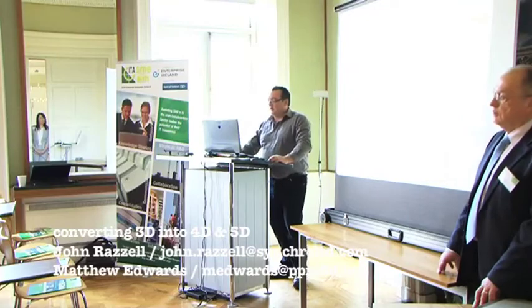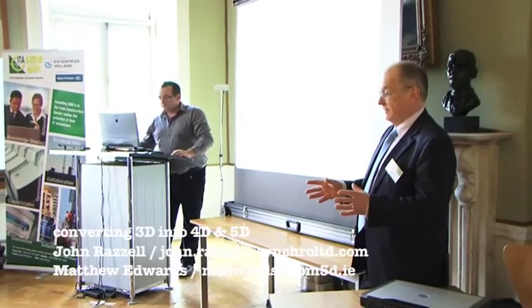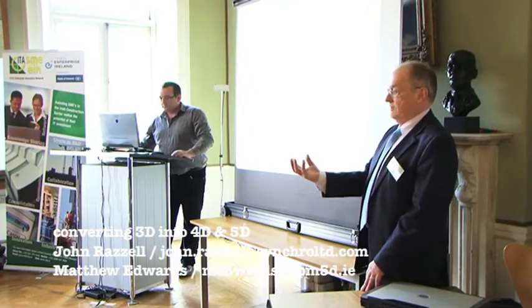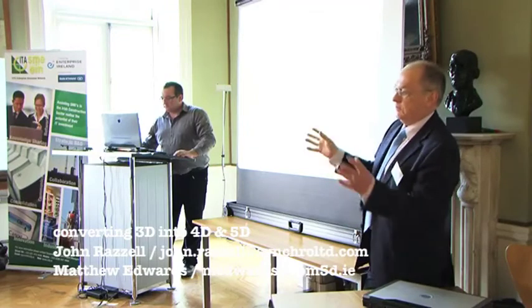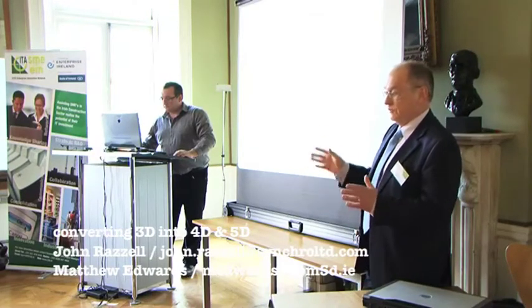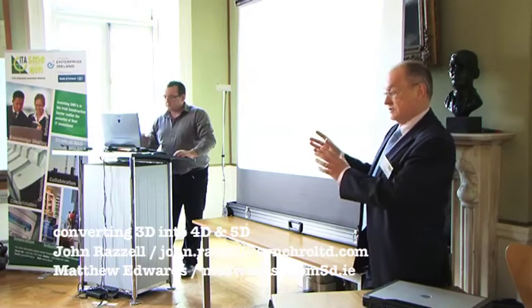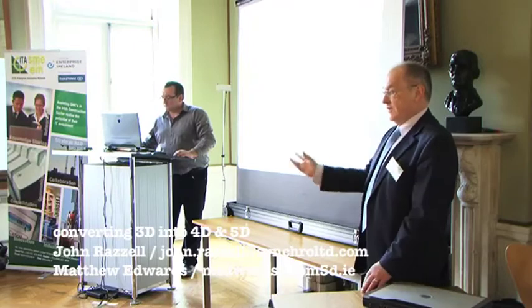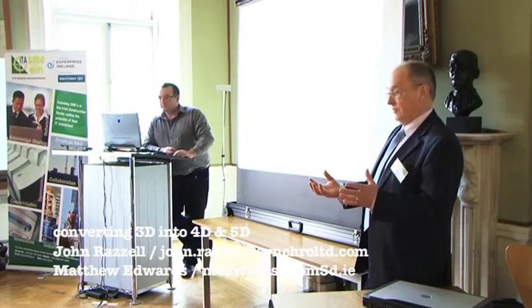Well, we look at clash detection as being from the buildability point of view, the fact that you've actually got the crane, as you saw in the first drawing, the crane was actually coming through the glass roof. That's because we haven't shown you out. But that's where we look at clash detection really within Synchro, to make sure that you've got bits in the right place to do the job. And if the crane hasn't been moved, one of the things you've got to allow for with a tower crane is a lay down area to get it out.